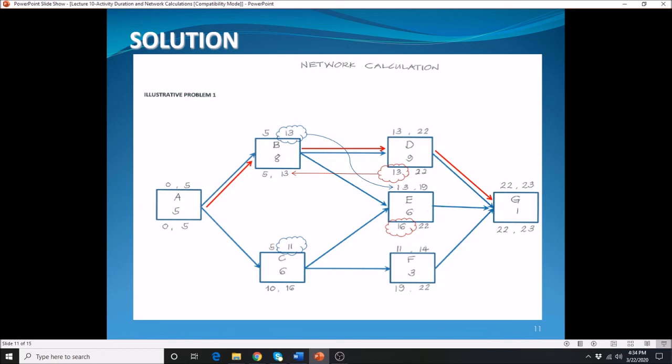And these activities that are in the critical path, those are the activities that you need to put focus on as a project manager, because you cannot afford to delay any one of those. If you are going to delay any one of those activities within a critical path, it can create an impact to the overall duration of the project.